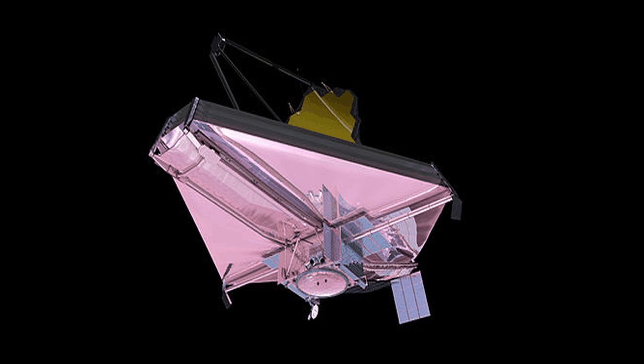In March 2018, NASA delayed JWST's launch an additional 2 years to May 2020 after the telescope's sun shield ripped during a practice deployment and the sun shield's cables did not sufficiently tighten. In June 2018, NASA delayed the launch by an additional 10 months to March 2021, based on the assessment of the independent review board convened after the failed March 2018 test deployment. The review identified that JWST launch and deployment had 344 potential single-point failures, tasks that had no alternative or means of recovery if unsuccessful, and therefore had to succeed for the telescope to work.